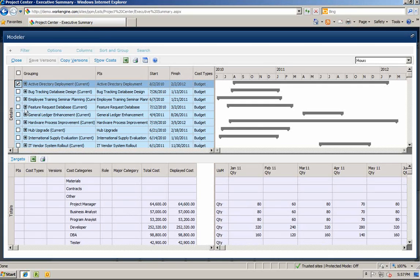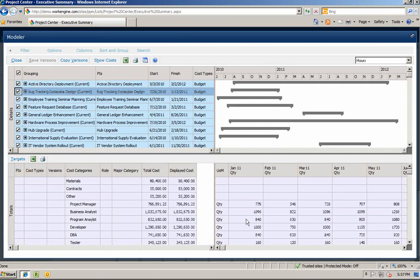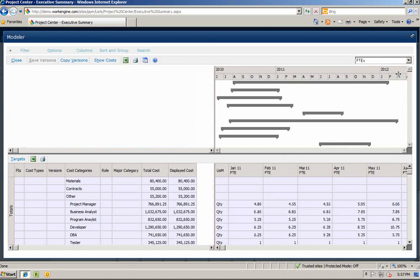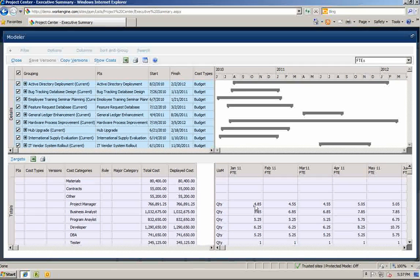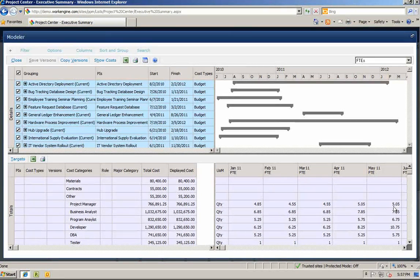Below you will see the different roles and the number of hours committed to those projects. You can also narrow down your view by clicking on an individual project. If you want to see these hours in FTEs, you can switch views in the top left-hand corner. You can now see that you need a minimum of 5 FTEs to fill the project manager role in this particular portfolio. Similar to the cost plan feature, you will also be able to apply targets such as planned budgets or see what your portfolio would look like should you add additional resources.